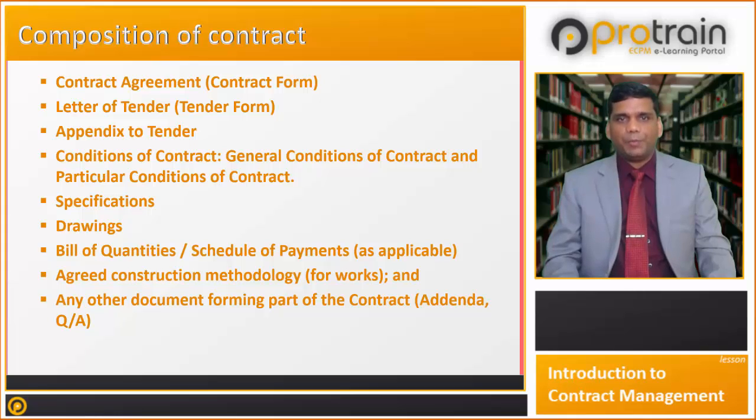It is prepared as a summary table and includes financial, administrative and contractual information such as contact details of parties, law and language of the contract, contract duration, disputes and arbitration provisions, amounts for securities and guarantees, delay damages, advance payment and repayment amortization, retention money provisions, minimum amount of interim payments, insurance provisions, and dispute resolution mechanism.